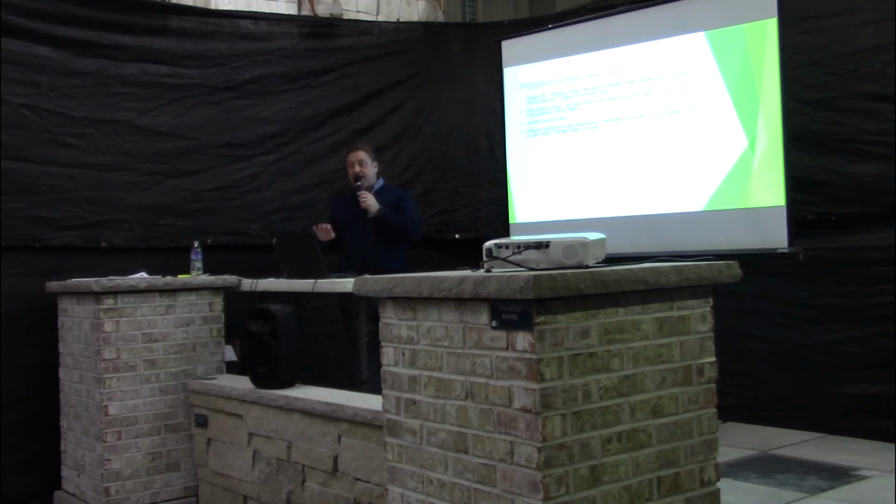If we're going to change, I got time to do that before we start the project, but if we make changes after we start, it's really going to start becoming a problem. It not only hurts the project you're on, it starts hurting the projects that you're going to do next, who are waiting for you to show up and start, because it starts adding work. And I think most of us who've been in the industry long enough have experienced that.